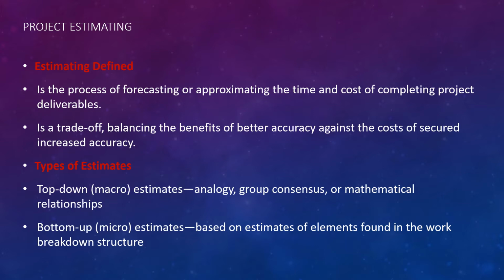And then there are really two ways that we can estimate. We can do a top-down approach, where somebody experienced says, okay, this kind of project is going to cost approximately X, Y, or Z, and I'll give you a range of accuracy on that as we move through the slides.